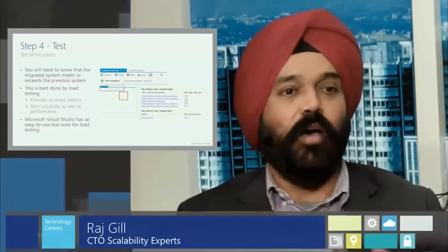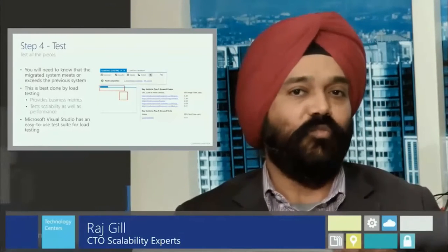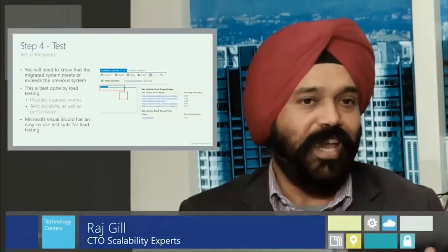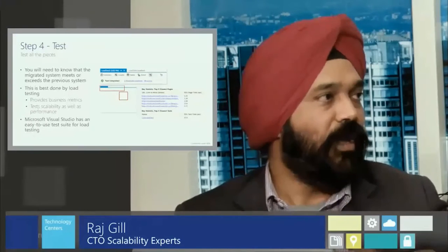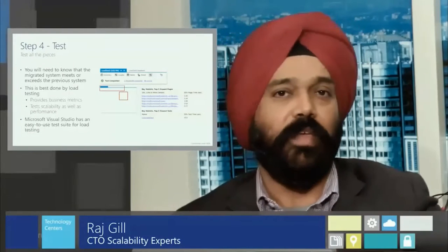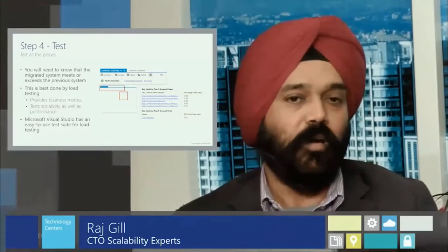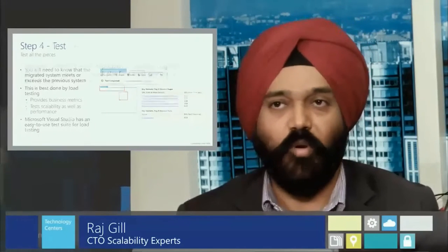So we tend to formalize this so that we can run proper tests for the infrastructure team, for the application team, for the business owners, and then get sign-off from them so they're satisfied with the results, and then they can sanction or approve the cutover. So again, just another important thing before the cutover.